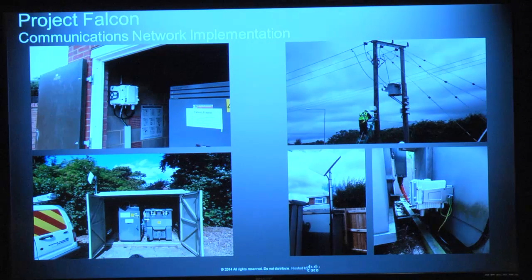What they found was a problem with vandalism started to occur where those antennas were effectively being knocked off by teenagers and the like, so they ended up having to change those out and start using some low profile antennas, which would reduce the vandalism incidents. But that was something they had not counted on and did not expect to take place.